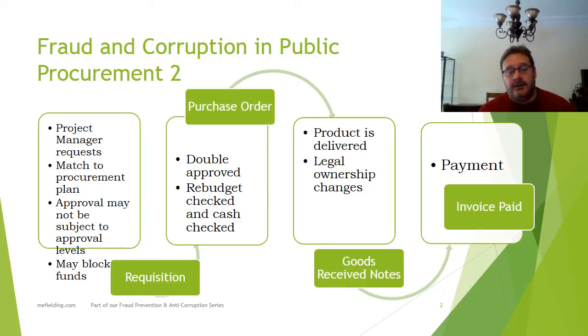If you have a long-term agreement or something that says you have a permanent contract with one supplier, then it may be that one supplier is enough. But your purchase ledger clerk will check that the correct procedure has been followed and that that's been correctly documented.